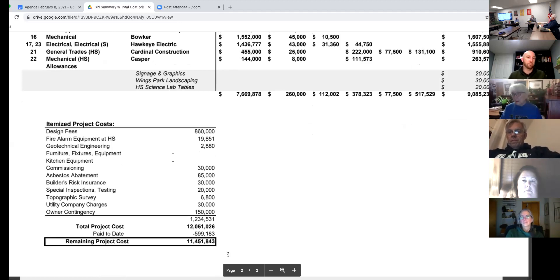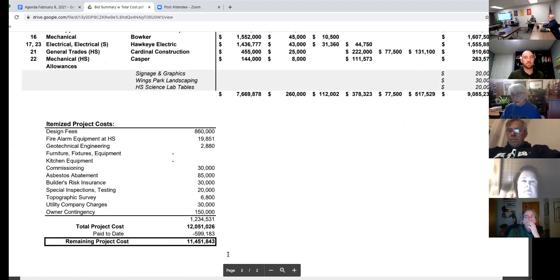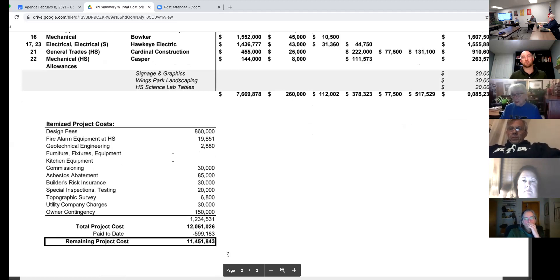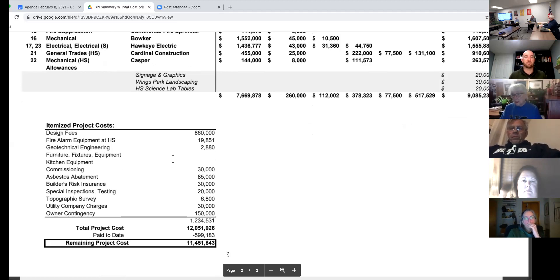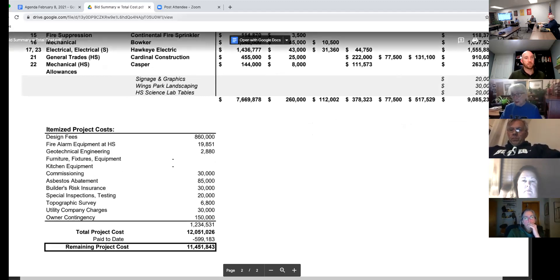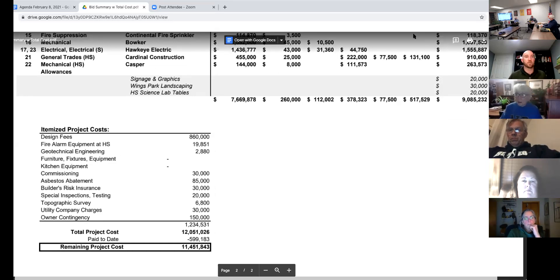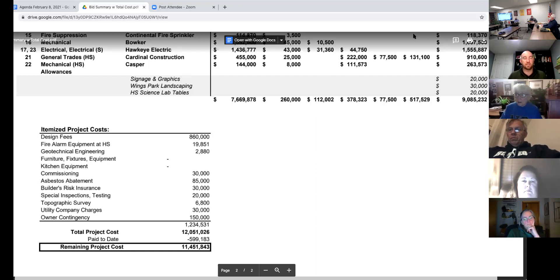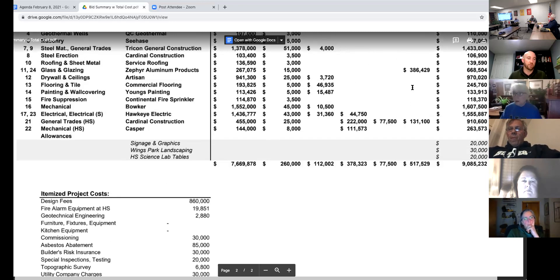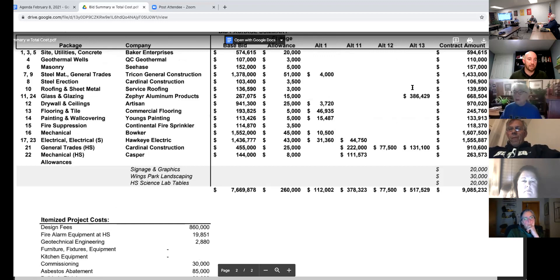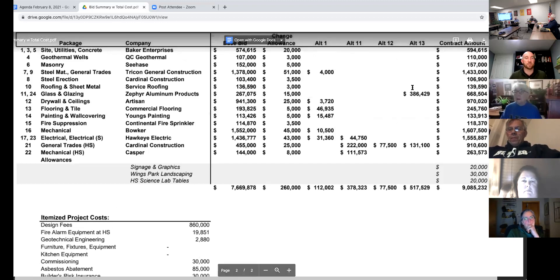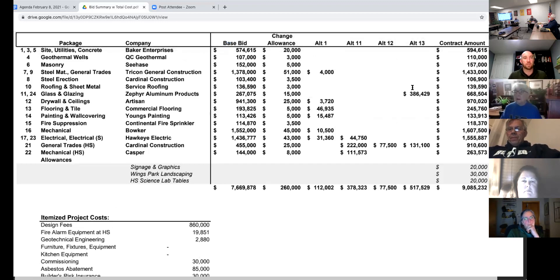Any of the Boyd Jones reimbursable fees, our general conditions and those things, basically, you're only paying actual costs plus a fee on all of those things. So if we're not out here as long as we're expecting or if we don't need as much labor cleanup or equipment and those things, you're only paying what our actual costs are. So we'll be submitting a detailed billing each month for those. So there's opportunity for savings in those as well. So really, what you're looking at with the remaining project cost is really your budget. It's not a hard fixed cost.